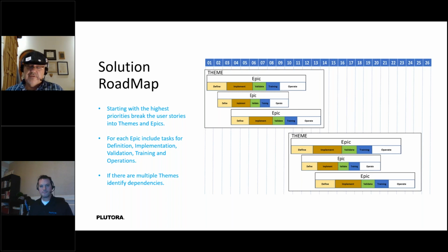You won't know the cost, for example, and that's critical to define an ROI case. If you don't know the cost, you certainly can't define the return on investment. And if it's a significant project, then I don't know how you get approval unless the approvers really are just going to go on your word, which may happen, I guess. But for the most part, you're going to learn a lot yourself when you break it down to this level of detail. And as soon as you have approval, then you can start implementing, because now you've got all the user stories already ready to go.